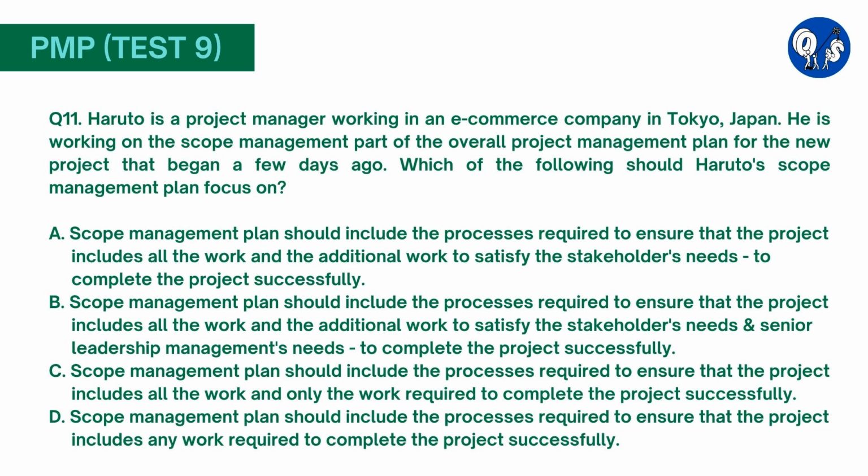Gold plating occurs when the project team adds extra features that were not part of the original scope, usually as freebies for the client. Often, gold plating is well intentioned and may initially seem like a good idea. The client may appreciate the extra work, but it can also upset them since the changes were made without their approval. Either way, gold plating is detrimental to the project and is not the correct PMP procedure.